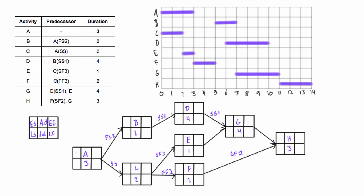For activity A, it starts at the beginning, so we have zero plus three - early finish is three. For B, it's a finish-to-start relationship with a lag of two, so activity B's earliest start is two days after A's early finish. Three plus two gives us five, and five plus two is seven for the early finish. For D, with a start-start and lag of one coming off of B, activity D can start one day after B starts, so it will start on six. Six plus four gives an earliest finish of ten.